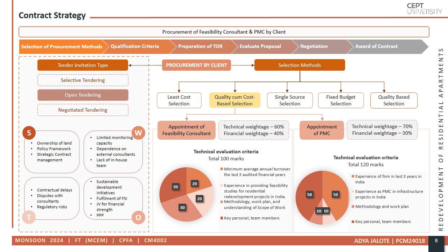The client starts by appointing a feasibility consultant and a project management consultant. The client has used open tendering method for the tender invitation type, and the preferred selection method is quality cum cost based selection. Under the QCBS system, different weightages were considered for technical and financial evaluation of feasibility consultant and